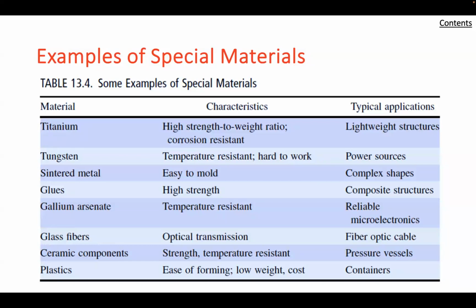Next, we can think about concurrent engineering. There can be a lot of different things that need to be going on in parallel, and to minimize the risk inherent in a variety of circumstances, it has been recognized that the specialized engineers who are particularly versed in production, maintenance, logistics, safety, and other considerations should be brought into the advanced development process to inject their experience into the decisions on design and early validation.